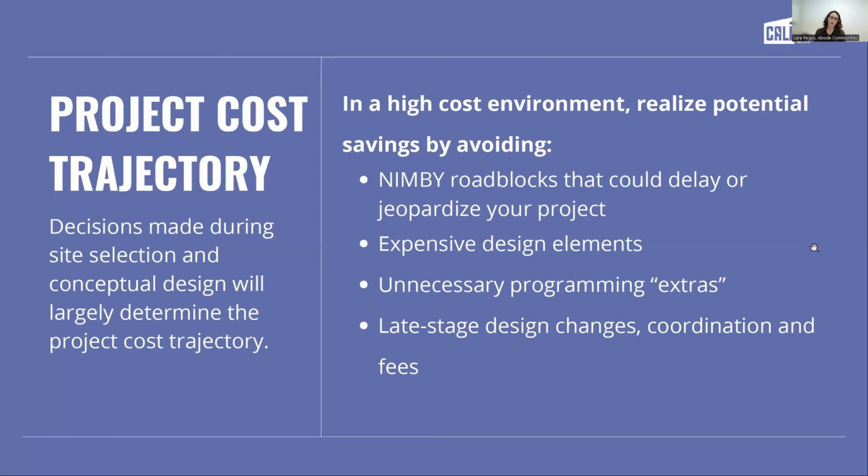It's really important to try to avoid putting really anything quote unquote extra into your project that's really not essential and going to be useful and meaningful to the folks that live in the building or to the surrounding neighborhood. And then of course everybody knows late stage changes in your design always cost more at the back end than they do in the very early stages. So those of you who do this a lot or hope to do this a lot as you're embarking on your development career, just really key reminders here to try and figure it out early with your team.